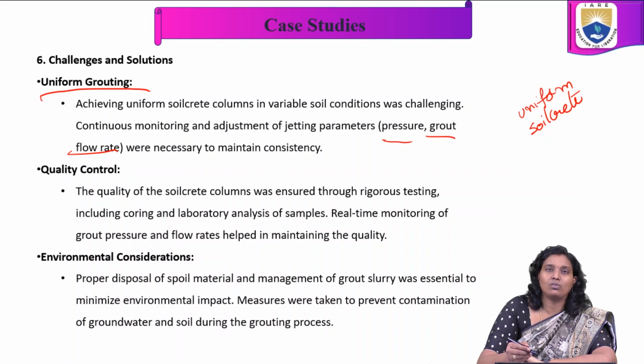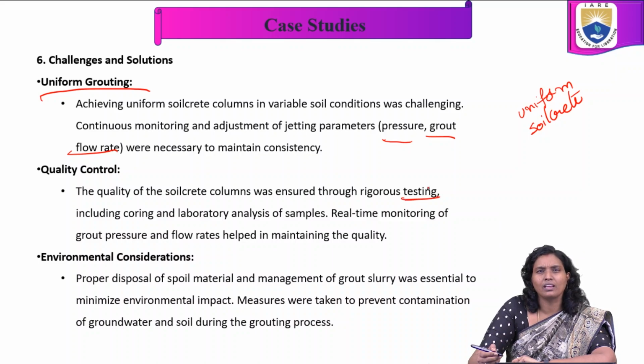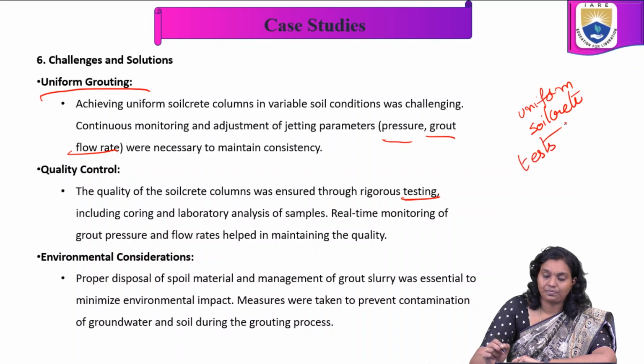Now, quality control: the quality of the soil-crete columns was ensured through rigorous testing. We have to do this testing, including coring and laboratory analysis of samples. Only then do we understand the quality control, so we have to conduct the tests.